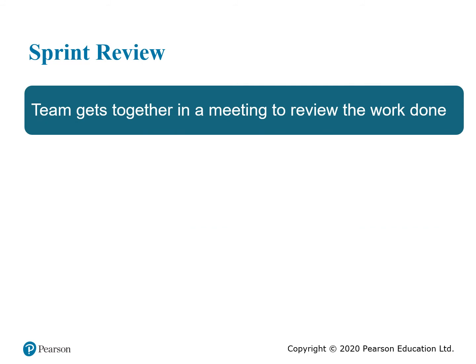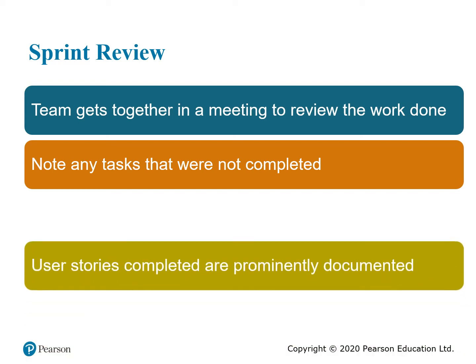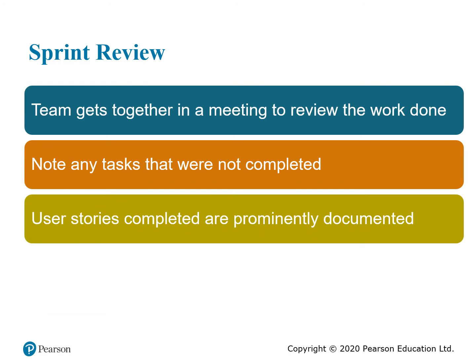So as we said, the sprint review is a meeting where the team gets together to review the work done. They notify any task that is not completed, and they review the reasons, and the person or the team in charge of those incomplete tasks. Then the user story is also documented here, to see whether they achieve customer or user satisfaction.